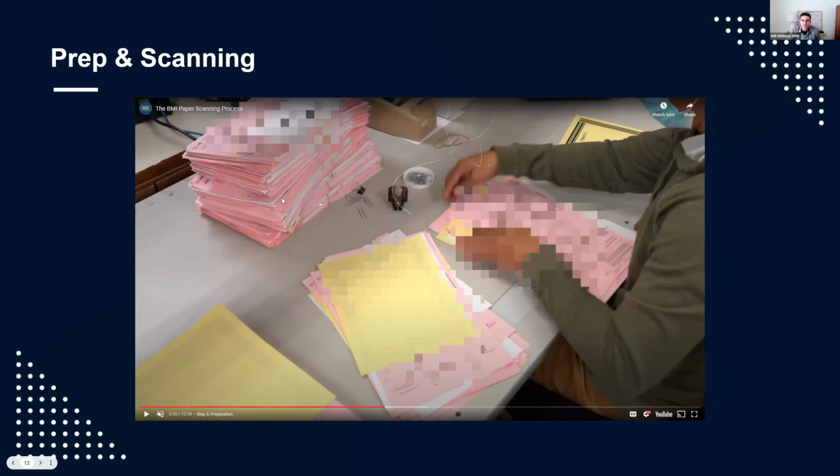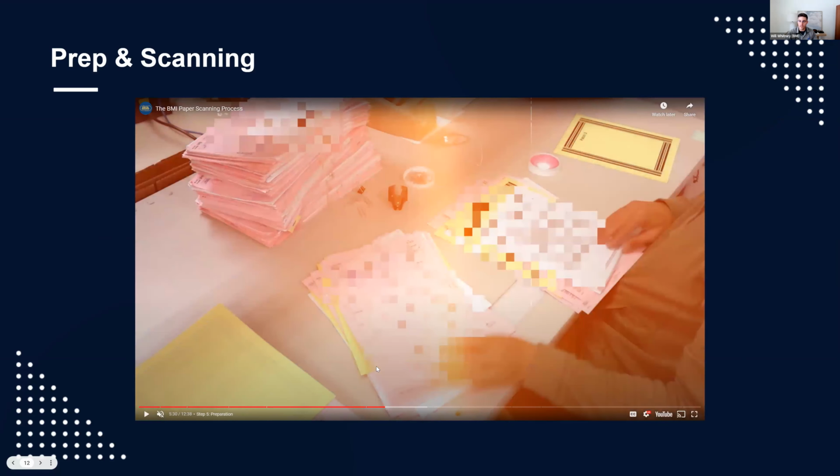Around there. But our folks have to sit there and do that for 10, 20, 30, 100, 1,000 boxes. So just doing that labor to get the files from here to here, remove rubber bands, take the paper clips out, take the staples out, put the pat sheets in if that's part of the scope of work. That takes a lot of time and effort. And that's why preparation is one of the critical components when we're pricing projects. Anything on prep, Jim, before I go to scanning?